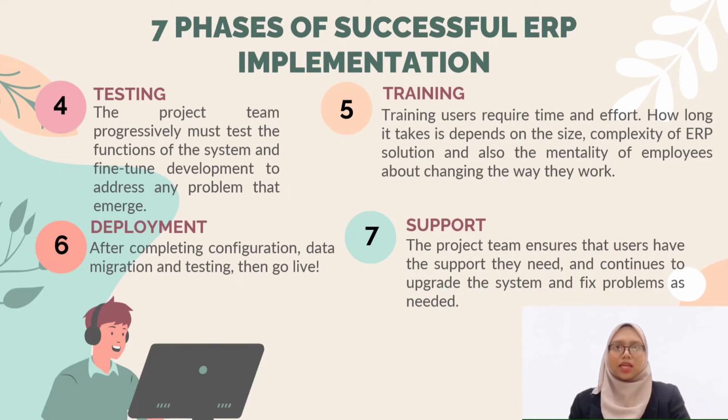Some data can be migrated ahead of deployment, while other information, such as current transactions, should be migrated immediately before going live. Last but not least, the support phase. The project team should ensure that users have the support they need and continue to upgrade the system and fix problems as needed.